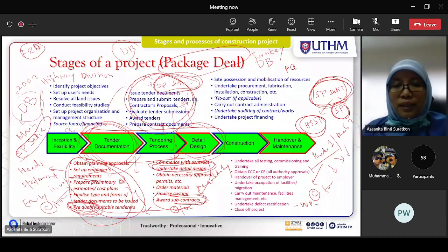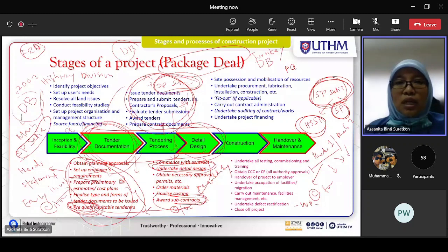But under SP Setia, the main contractor, they can also do the same, because like I said just now, this project is the highway division's first project, a road project. So they don't have connections with contractors who do road construction. That's why they do pre-qualification, so they have a list of potential subcontractors who can work with them. That is the purpose. Understand now the pre-qualification?